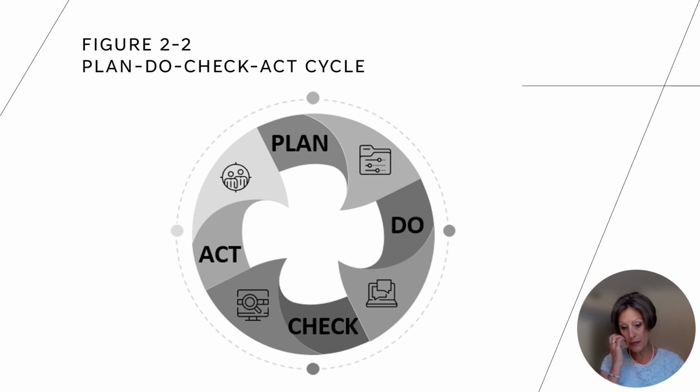Traditional waterfall process. A traditional waterfall process is often deployed for simple projects with low risk. A project with low technical uncertainty means the technology is known, tested, and established. This does not mean that the technology is not sophisticated. Innovation staged and gated processes are aptly deployed when the requirements are known upfront as well. Thus, the project is defined as low risk. We know how to create the product or service, and we know what outcomes, features, and functions are expected.